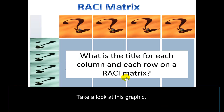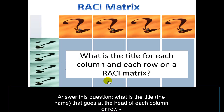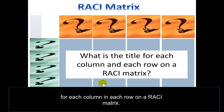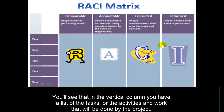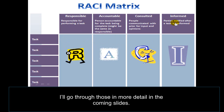Take a look at this graphic — I've put question marks where the headings for the columns and rows go. What is the name that goes at the head of each column and row on a RACI matrix? In the vertical column you have a list of the tasks or activities and work done by the project. Across the horizontal, you have the RACI: Responsible, Accountable, Consulted, and Informed. I'll go through those in more detail in the coming slides.